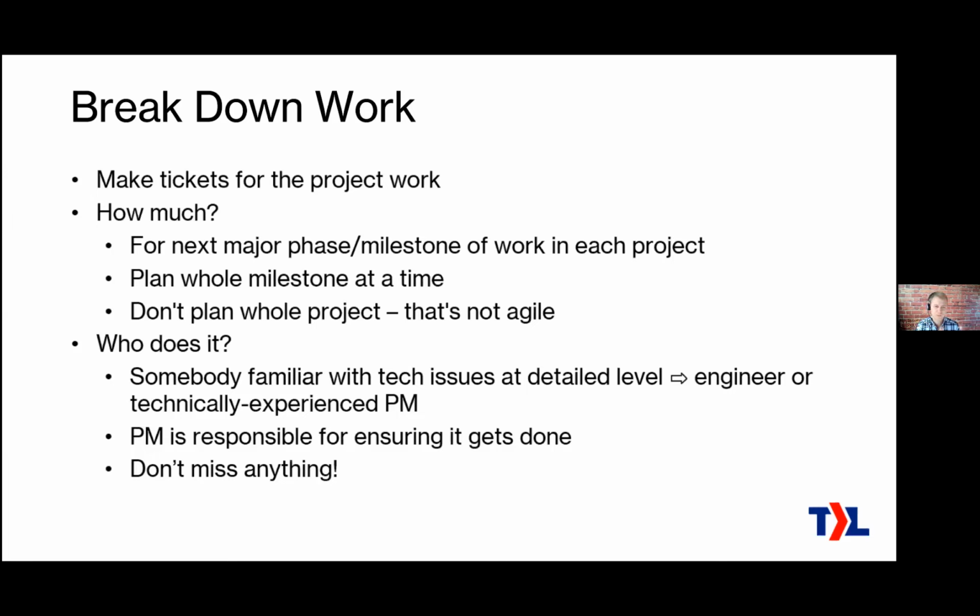Because that is the easiest way to have an unrealistic budget and find out in the middle of the project that you overlooked a bunch of things. Obviously, we don't want to do that, and that's part of the reason why we go milestone by milestone, because it helps to not miss anything when you're doing one milestone at a time.